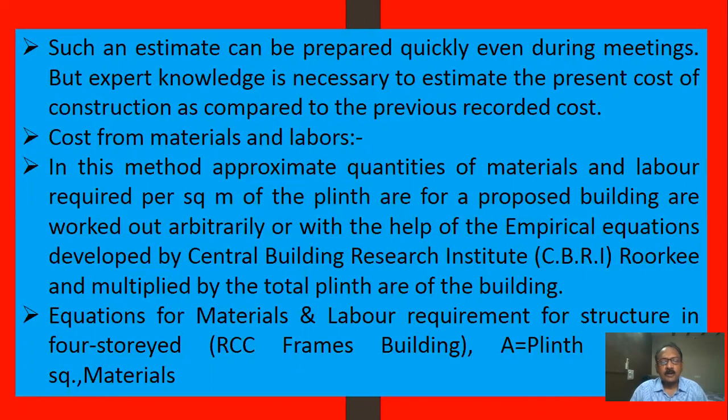This rate is multiplied by the total plinth area, like the plinth area method, but here, according to quantities, you have to calculate the plinth area of that item.